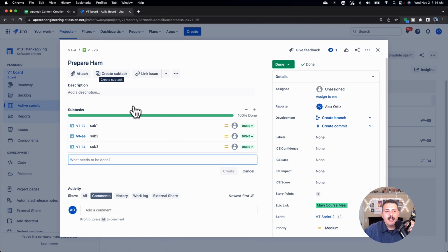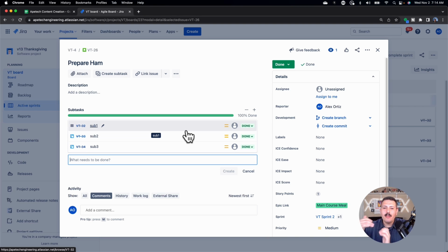The subtask here is very powerful, but it has some drawbacks. The power is you can't have a subtask that is an orphan. So that's a really good thing because every subtask must be tied to a bigger purpose, must be tied to something a little bit more impactful. The subtasks also describe how something should be done. So the subtask is great to basically work as a to-do list so that your developers can capture many requirements, many steps of what they're going to be doing to make this story come to life. And so it's a very much more intimate thing.